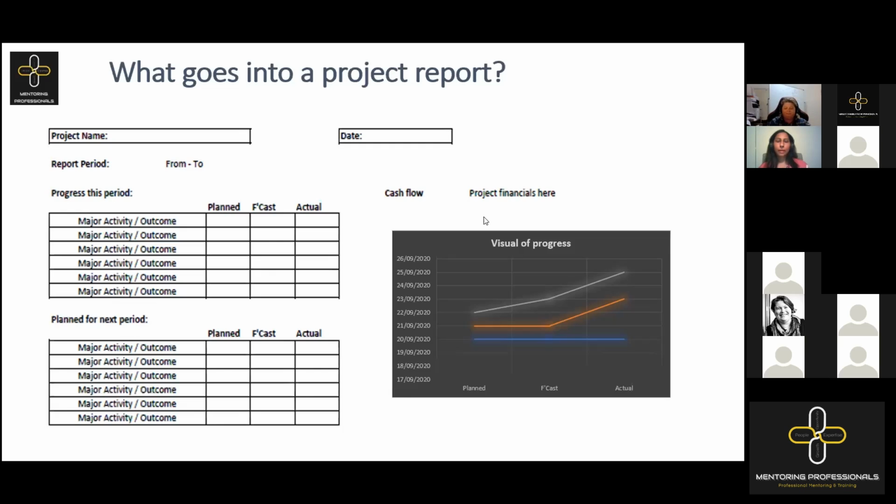I mentioned the budget, how much money you are going to use for the uncertainties. Yep. So something that comes into scope, it's a new change request that's come in. And of course, part of that impact assessment is how much money that is going to cost us, because if we are working within our budgets and our tolerances, that change request might put us outside of that tolerance, in which case it needs to be escalated. What else? Why else might we need that information on our project report in terms of the number of change requests for scope?